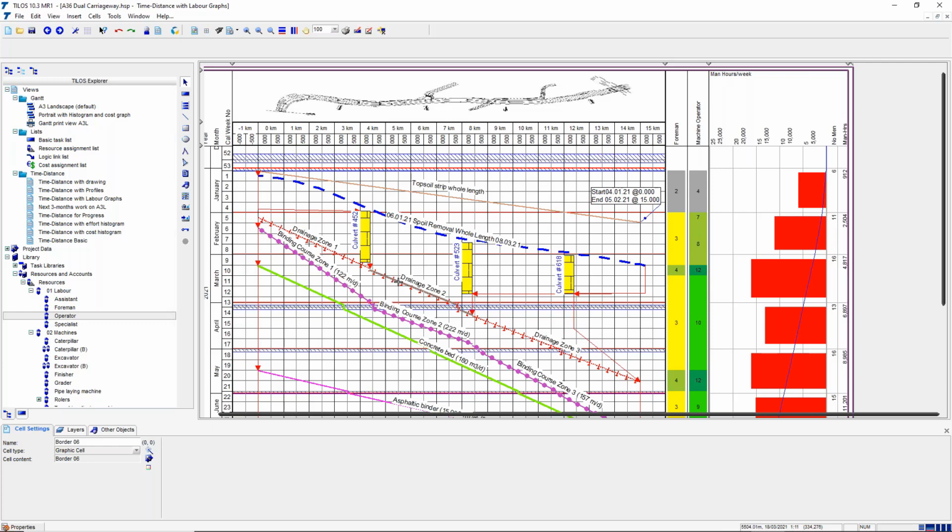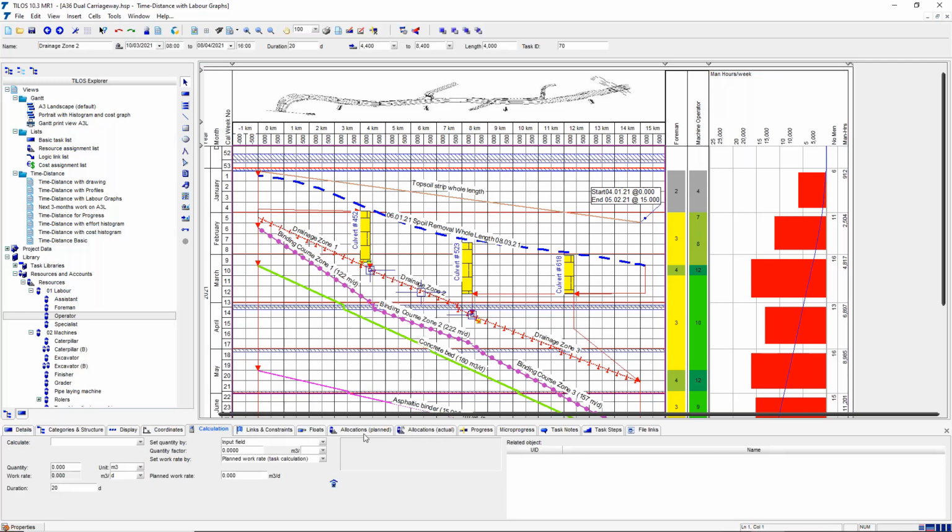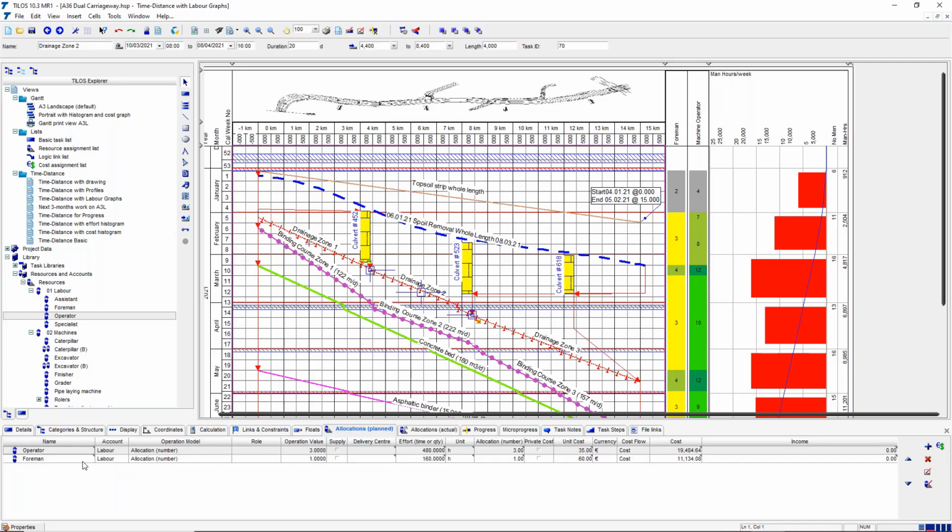So we could take an activity, and if we look at that activity, these are the resources that we've inherited from the task template. In this case, I might need 4 of these people, not 3. So I can change that value, and we can see that value change in a histogram. If I undo that change, you would see that change on the screen.